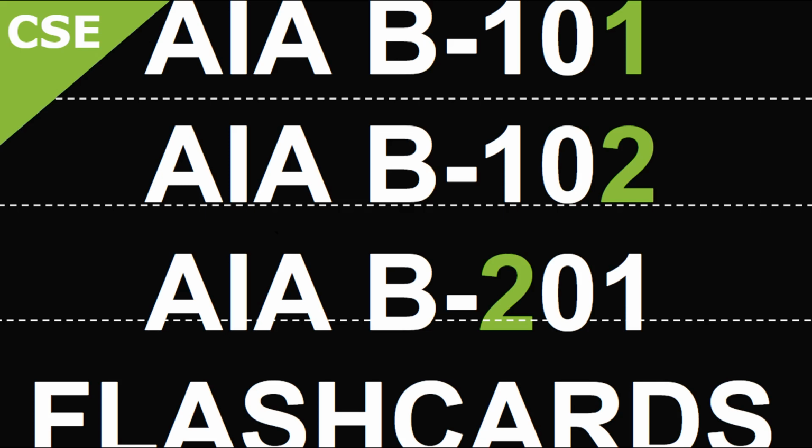What's the first service of an architect provided under the schematic design phase in the B101 contract? The architect's first service is to prepare preliminary evaluation of the owner's program, schedule, budget, site, and then notify the owner of any inconsistencies. During the schematic design phase, what are the architect's primary deliverables? The deliverables include the site plan, building plans, sections, elevations, preliminary building systems, and construction materials to be noted.